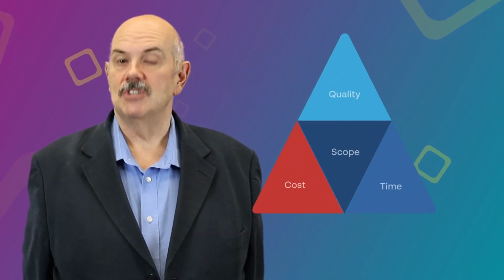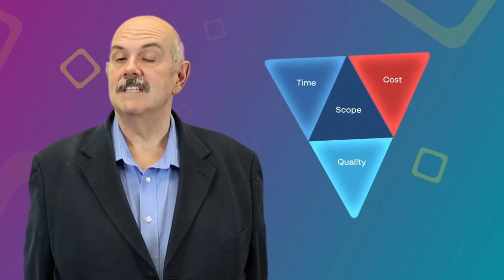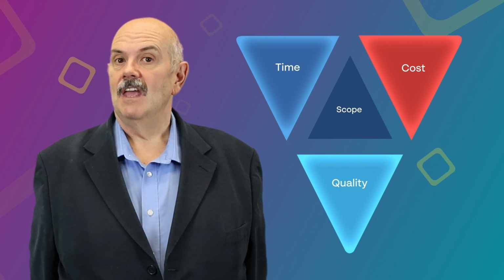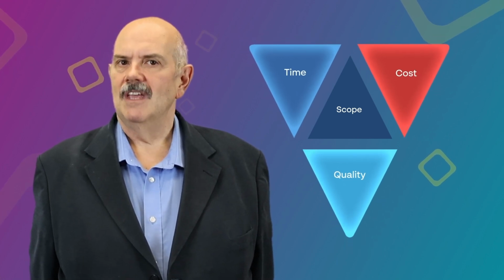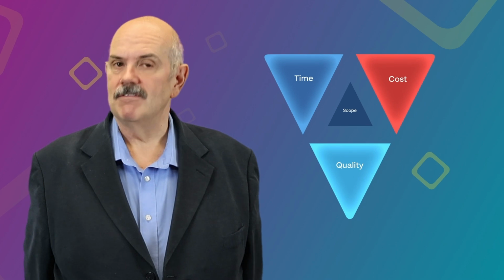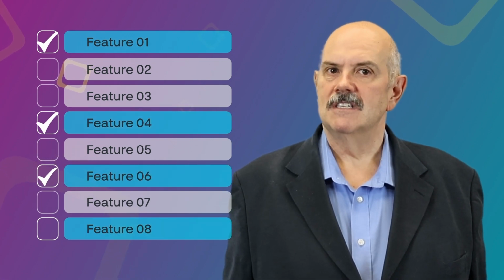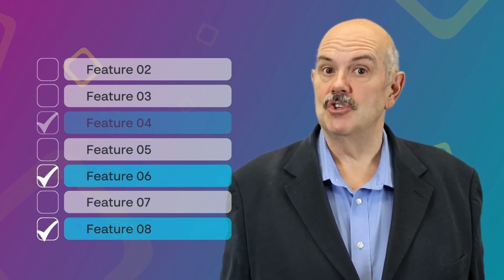Given a clear, high-level business vision for what the project needs to achieve, the AgilePM approach turns the traditional time, cost, scope of features triangle on its head. The default for AgilePM is to fix time, cost, and quality, and when the real world puts projects under pressure, the scope of the features delivered is reduced to relieve that pressure. To do this, the features are prioritised, and work is planned in a way that ensures the most important of them are delivered first, and, when necessary to deliver a solution of the right quality, at the right time and for the agreed budget, the least valuable of the remaining features are de-scoped to make this a reality.